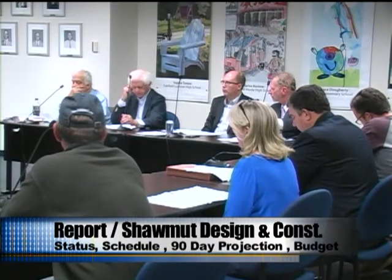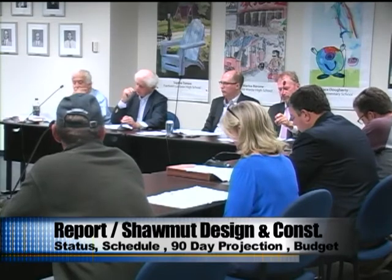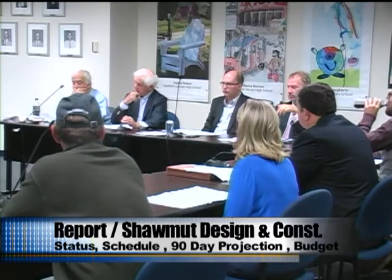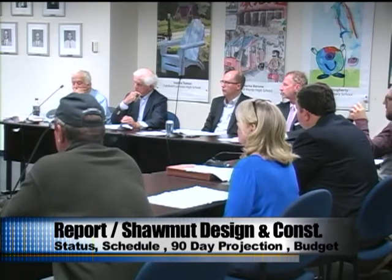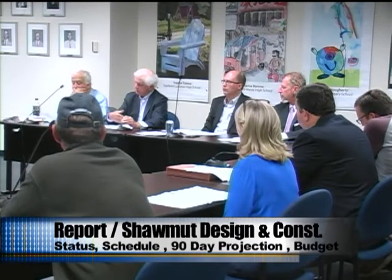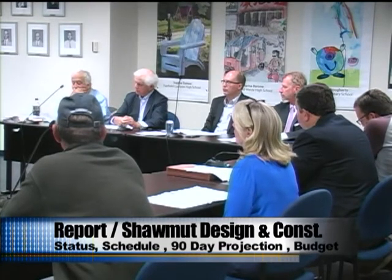Okay. So it's, in essence, a contingency for repairs. Right. It's an identified contingency rather than just a general contingency. But you could move money back and forth as long as you track it.